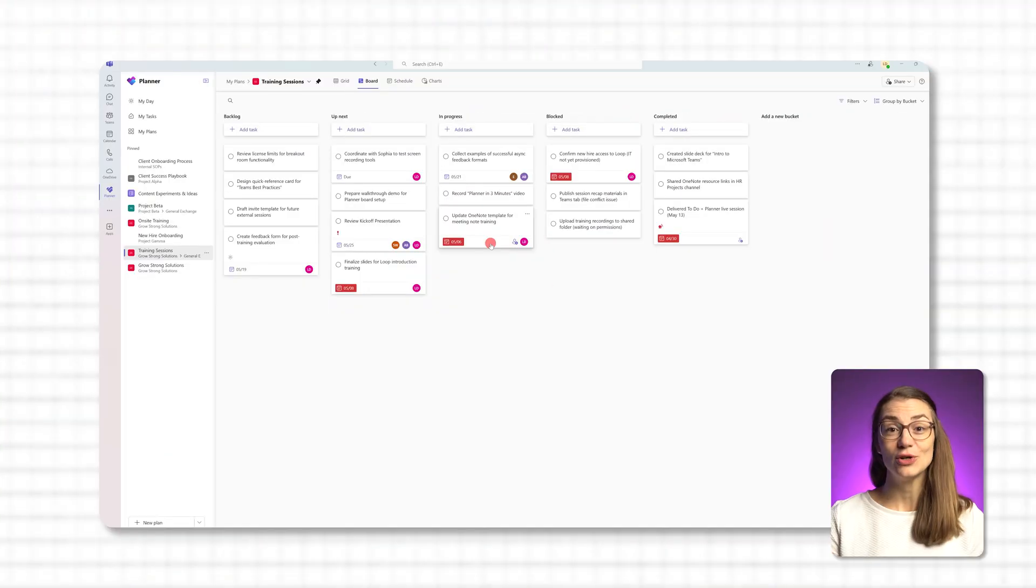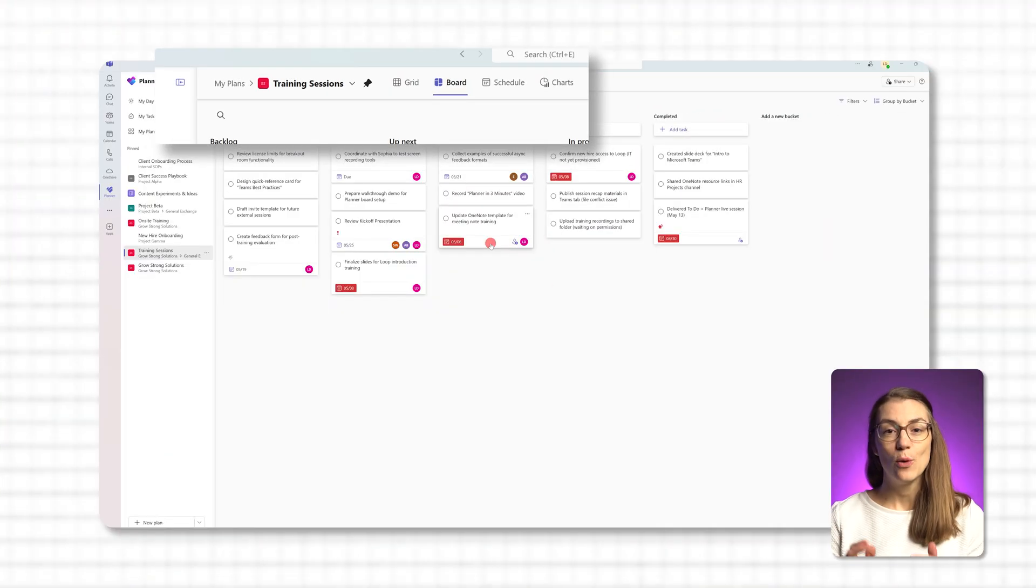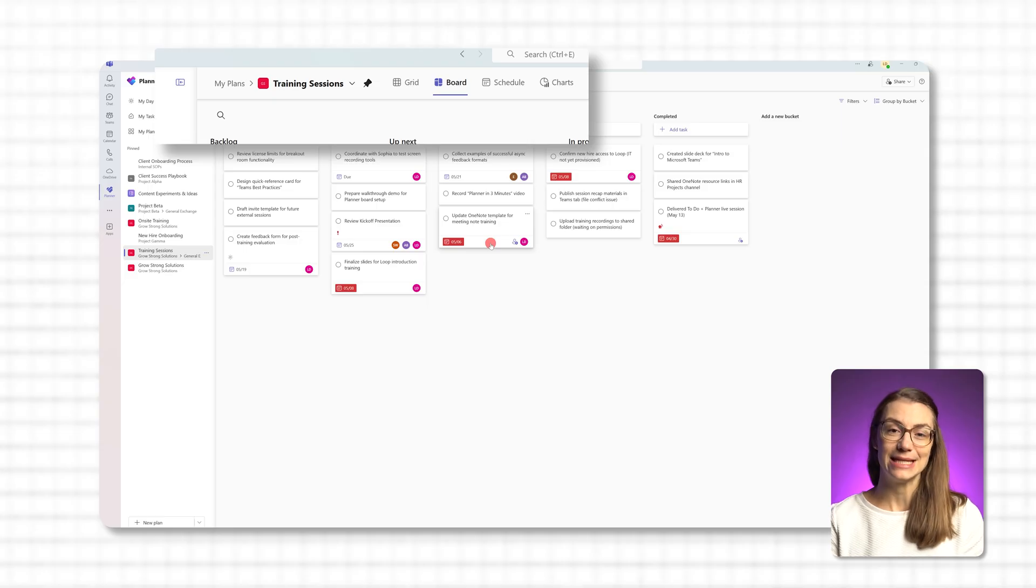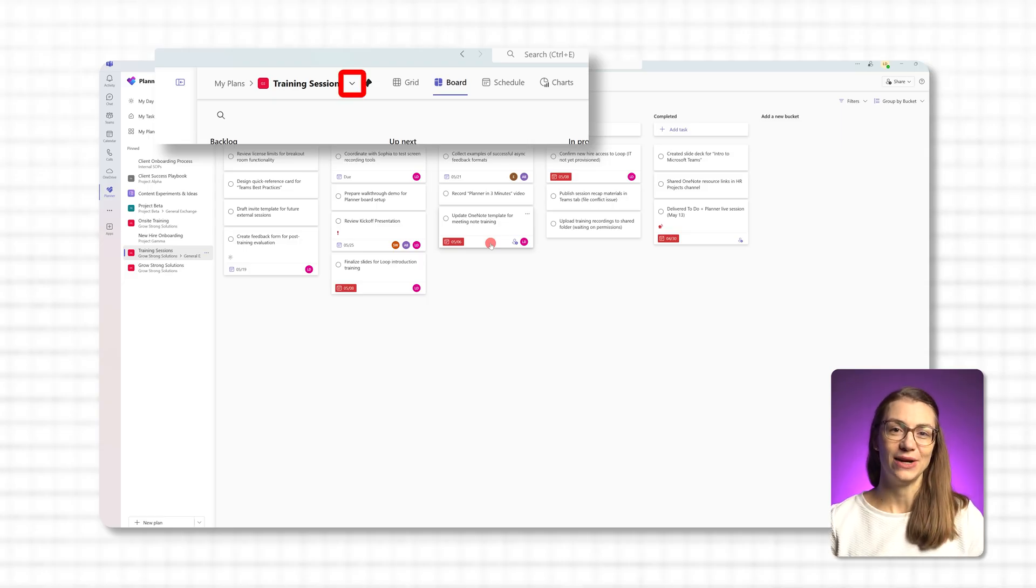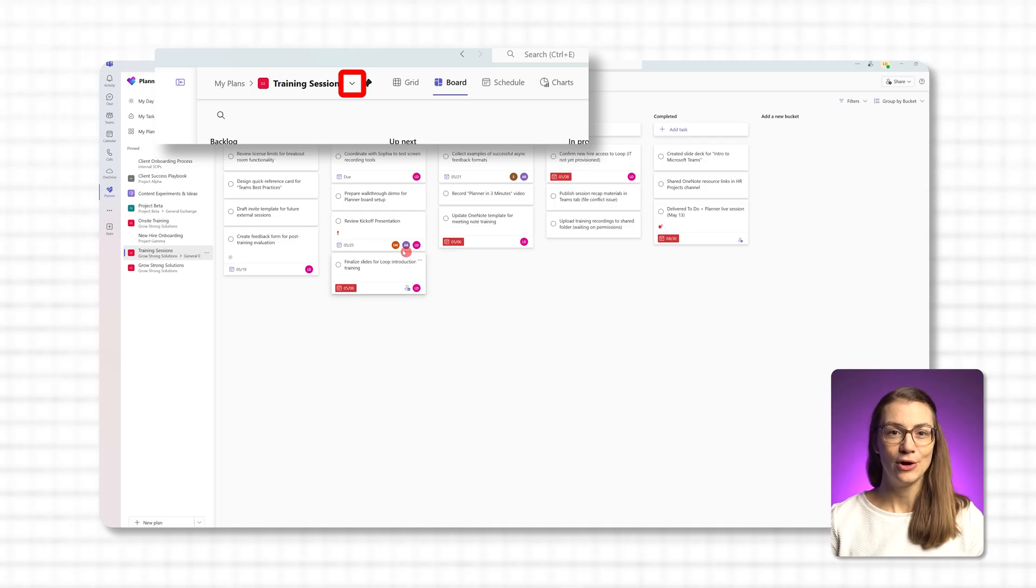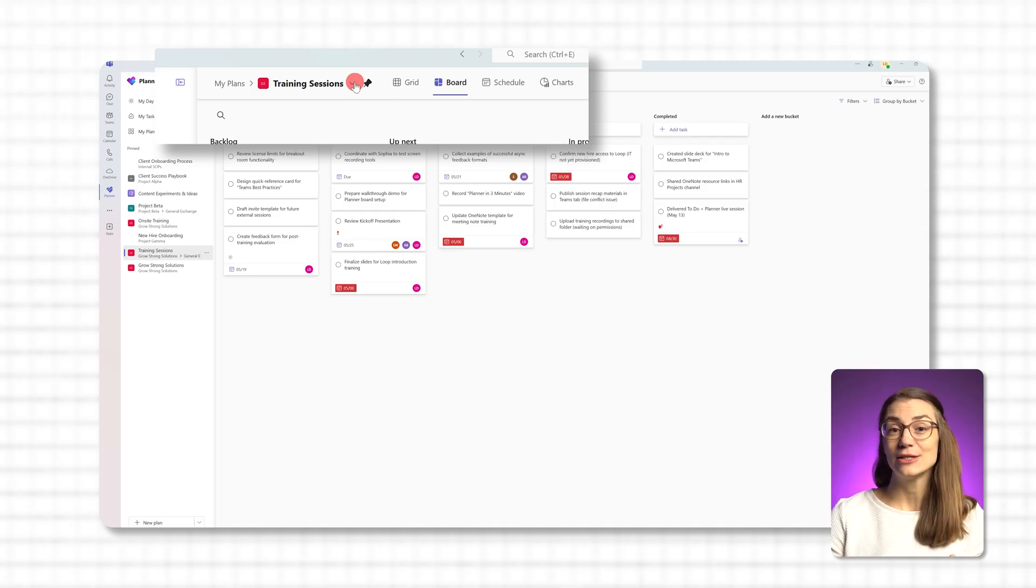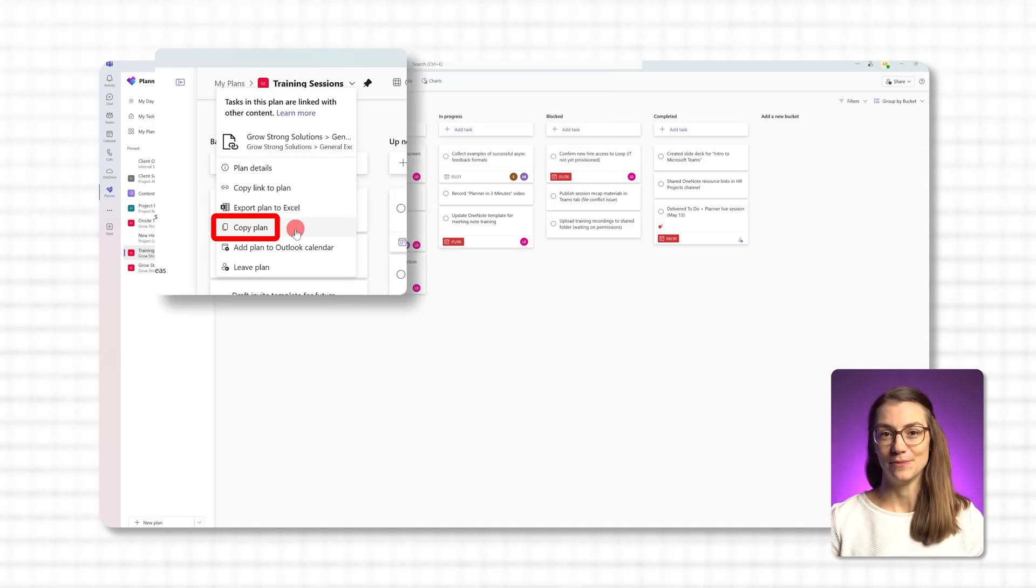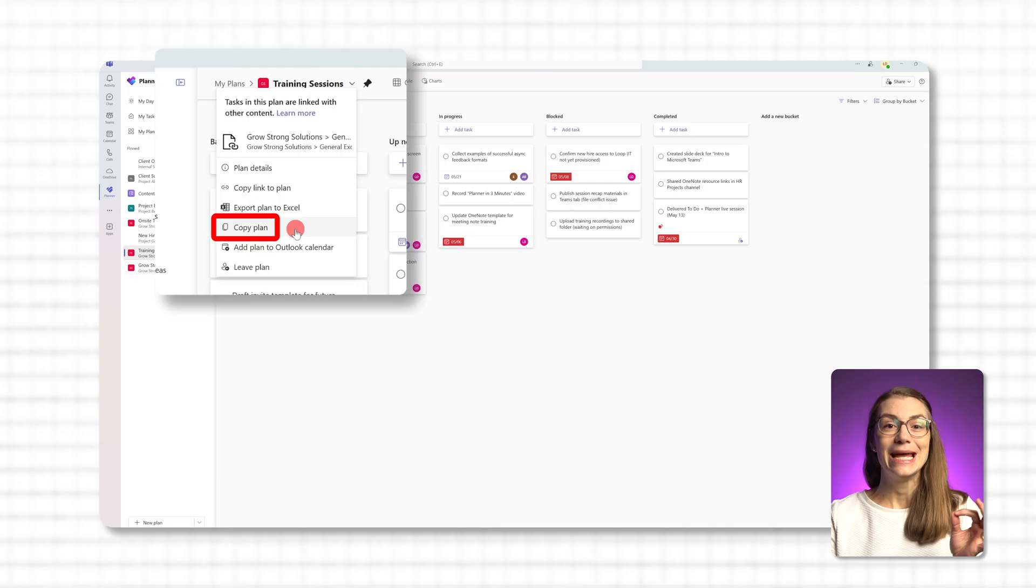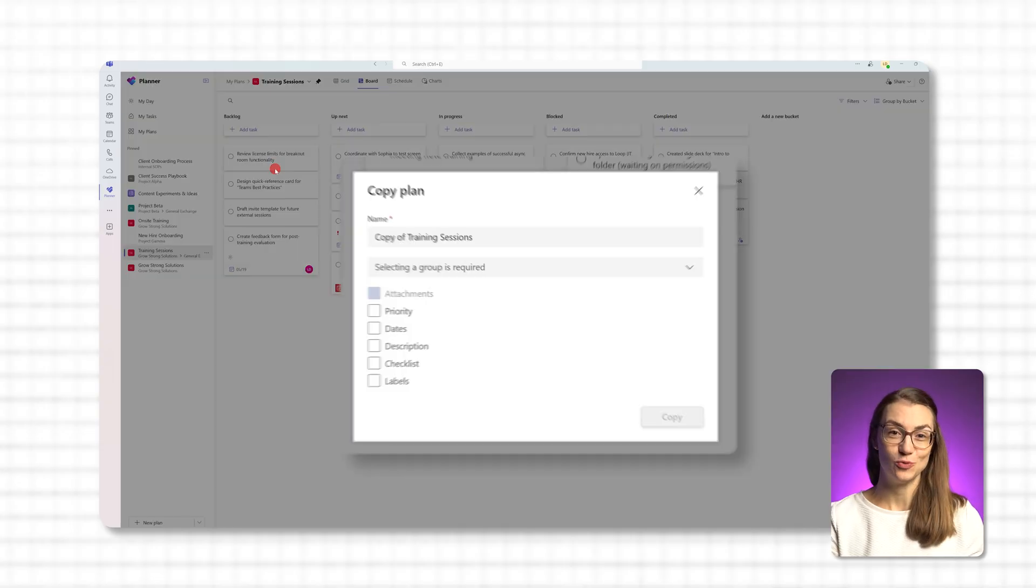Once you're in the plan, look at the top left corner where the plan's name appears. Next to the name, you'll see a small downward facing arrow. Click that arrow and then select Copy Plan from the drop-down menu. This opens the duplication window.